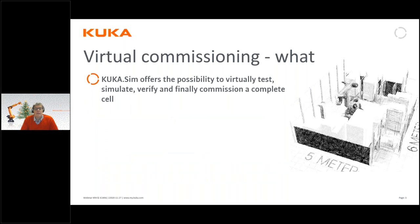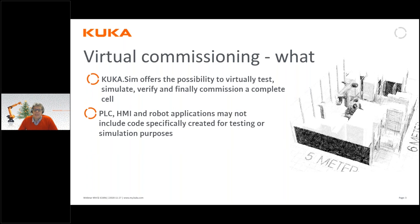We offer the possibility of verifying the PLC code. Usually when we want to test and verify for a commissioning or acceptance test, we want to simulate the actual codes without any extra code embedded in order to drive the simulation. We want to test the actual code we are going to use in the delivered cell. So this model is based on having no need to create any extra code within HMI, PLC, or robot application to drive the simulation.